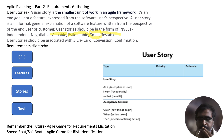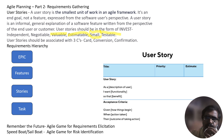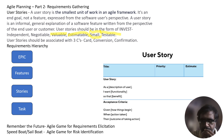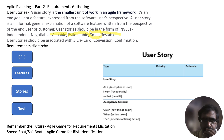Finally, we have Confirmation. Each user story should have associated acceptance criteria which specify the conditions that deliverables should meet in order for them to be considered complete. These acceptance criteria are generally written on the back of the card or sticky note used to write the user story.